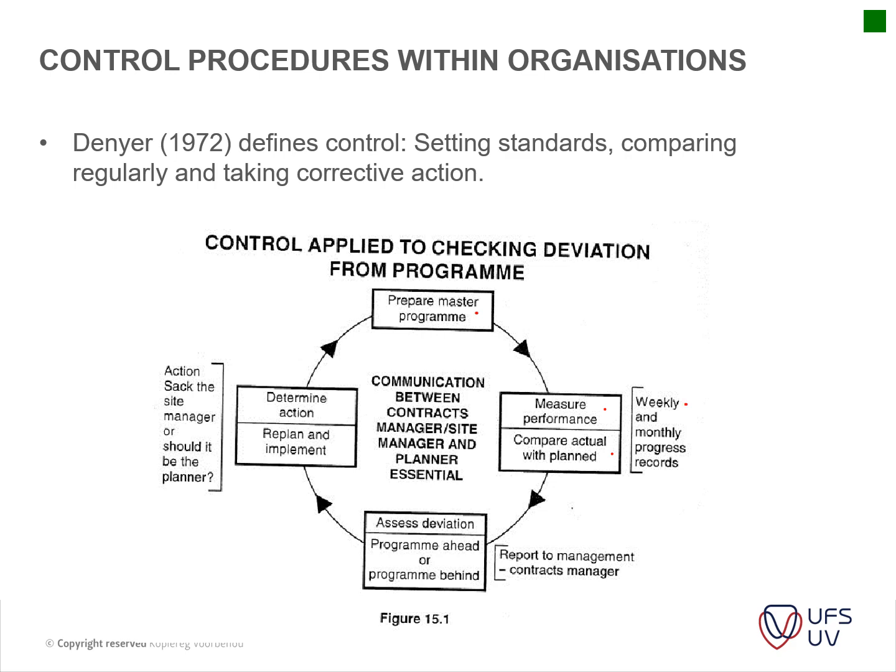This can be done weekly, monthly, or even daily, depending on how large the project is. You report to the managing contractor, and he will assess the deviation, program ahead or behind program. So he will make an assessment of that, determine an action, replan and implement. So this is very important.